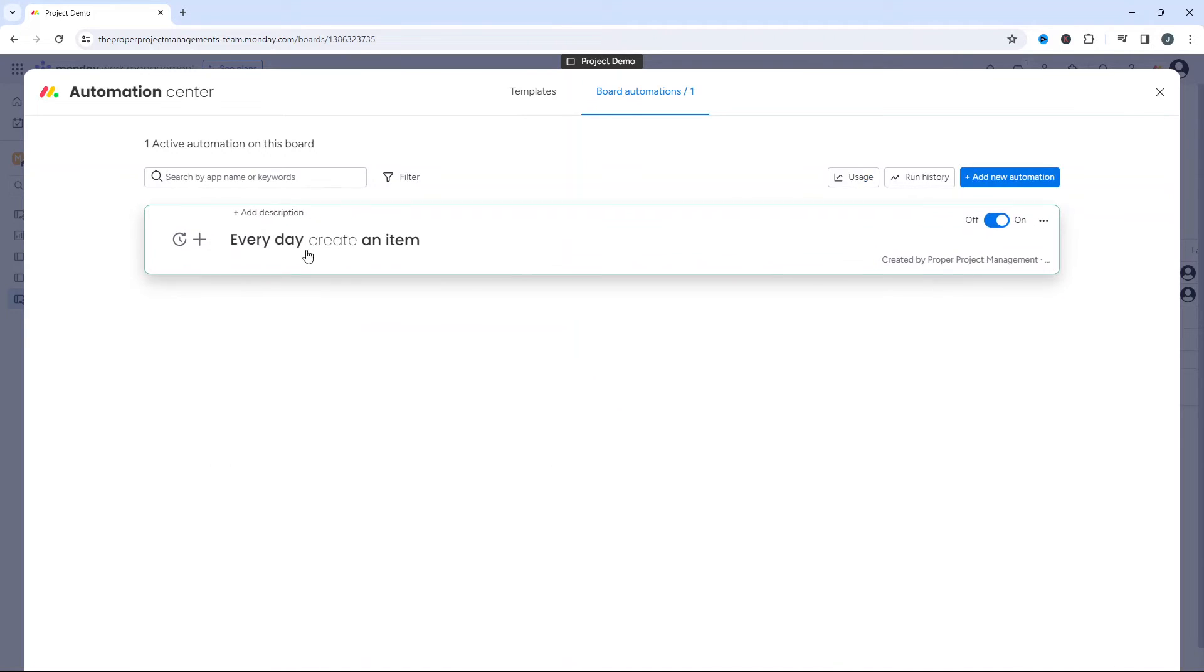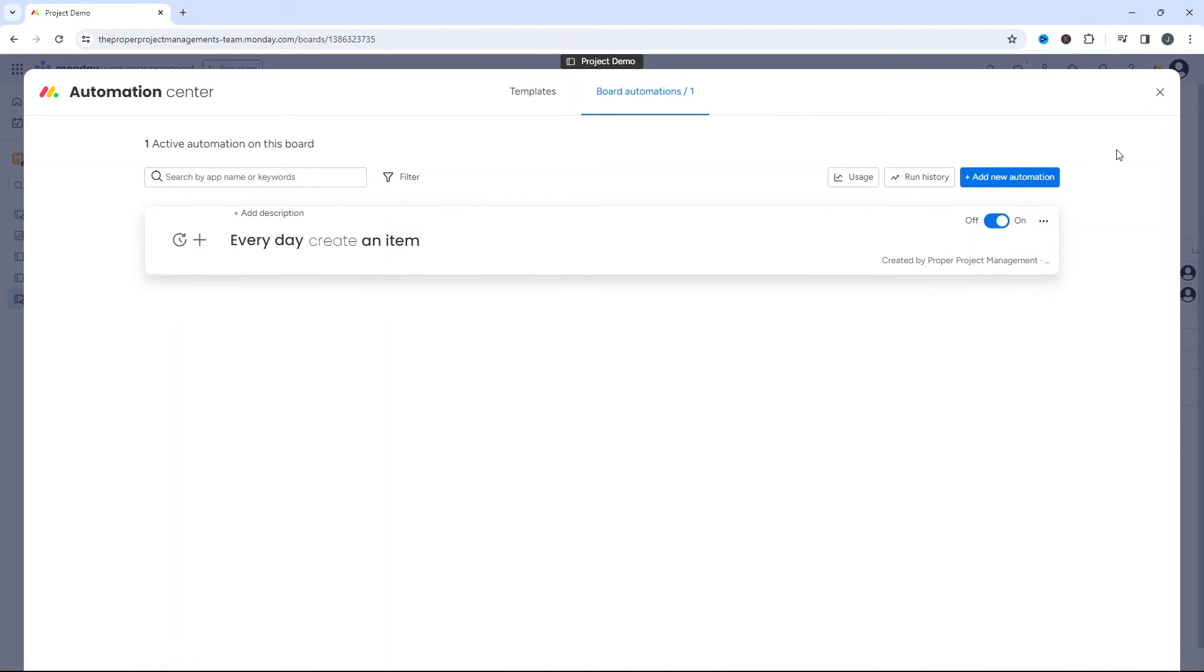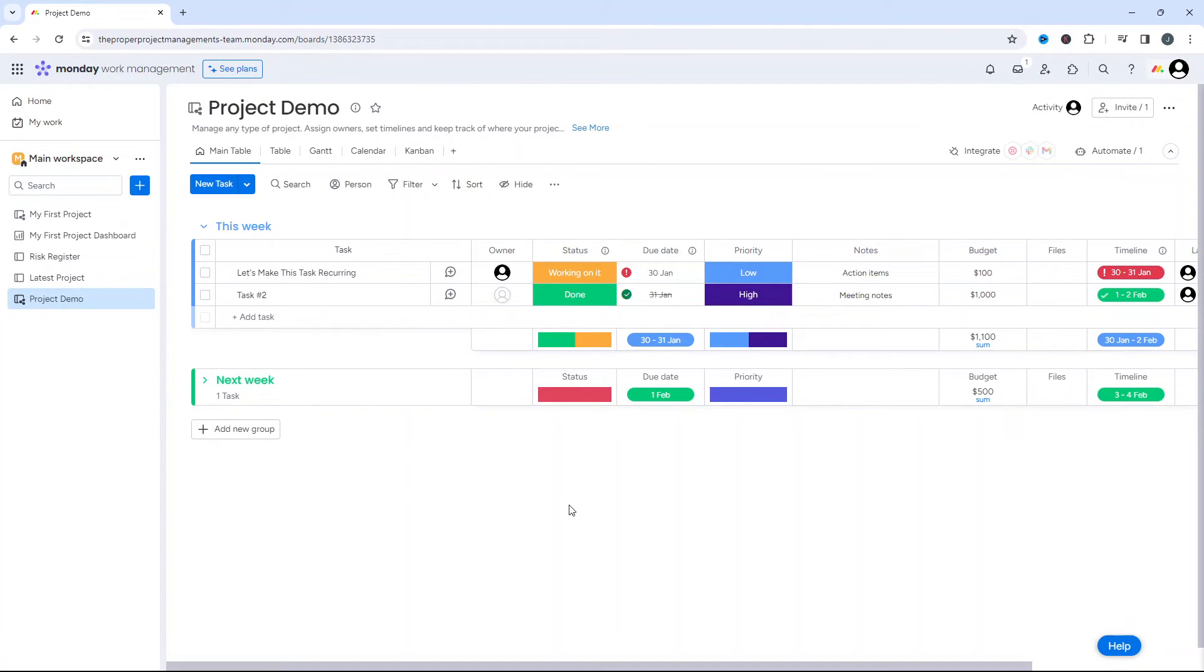And you'll notice here, you can even add a description for your own reference and it has an off on toggle. So it's on at the moment. But if I close this off, obviously this is set up for us. Every 9 a.m. it's gonna create this new task. If I wanted to turn that off,